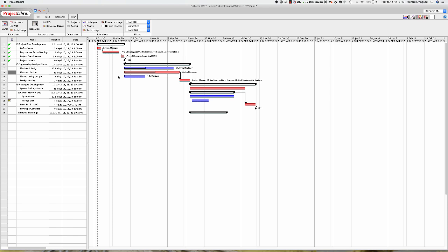So what we did was we had a huge plotter. It was a big machine. It did very nice big charts on big paper. And we made these Gantt charts, which gave us either a portion of the project or in some cases the whole project. It had all the tasks, the lines going out, and who was responsible for the different resources applied to a given project. And what we told everybody was, when you finish a task and have shown that you are done, we will allow you to put a green marker through your task to show that you're done.